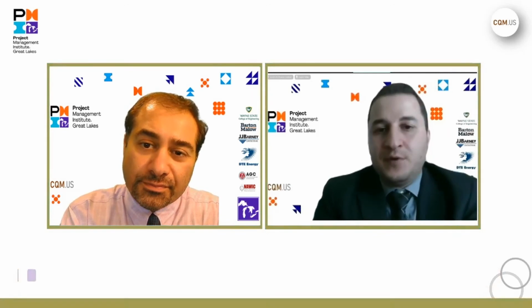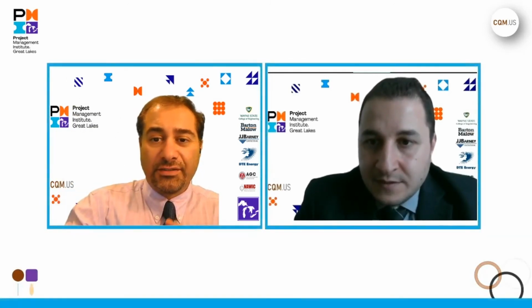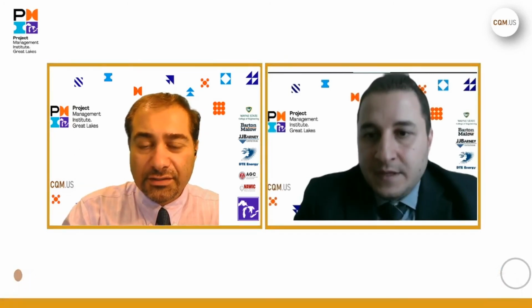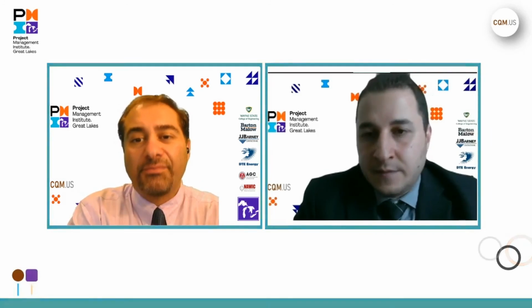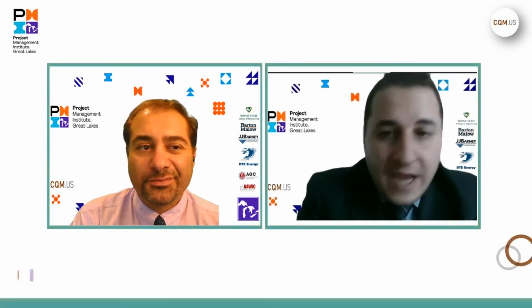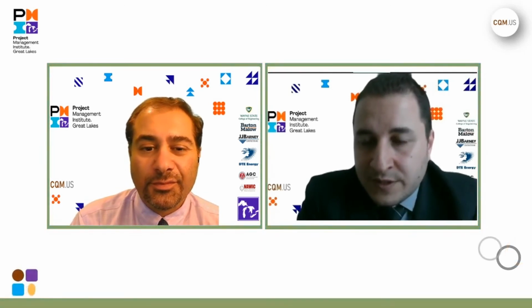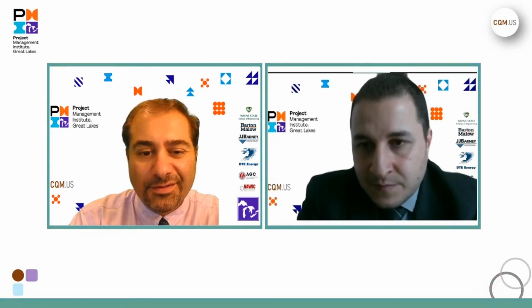Yeah, it is important. What I'm talking about right now is during the planning phase of the project. So these are future dates, because how would you get the weather for future dates? So we get the historical data, and based on the historical data, we want to get an average duration that we're going to face in our work in the future.